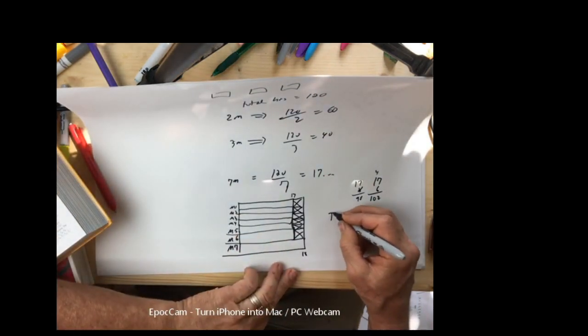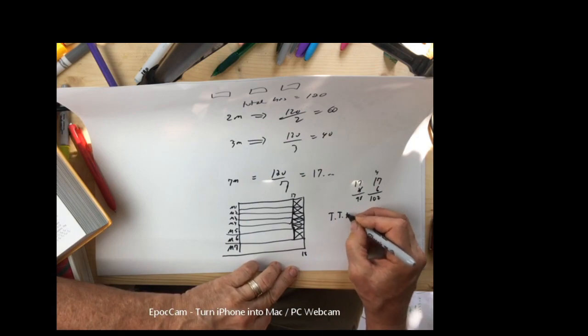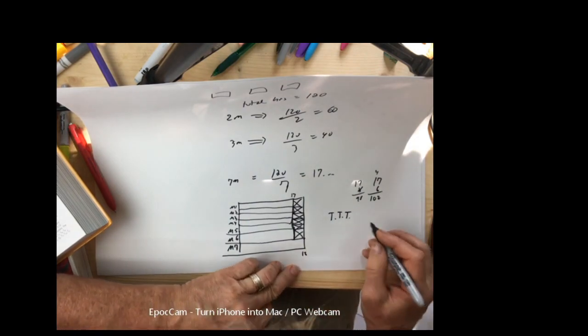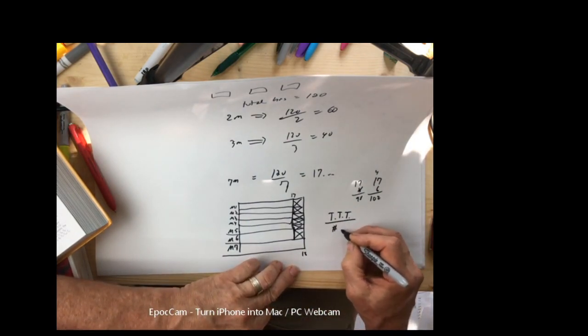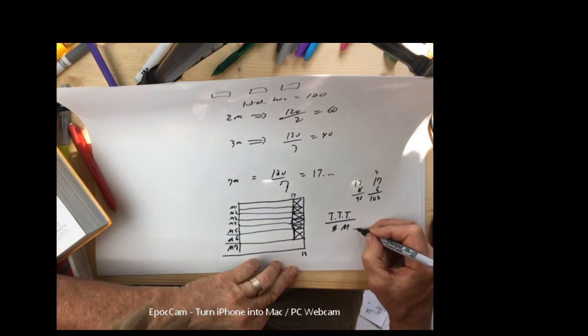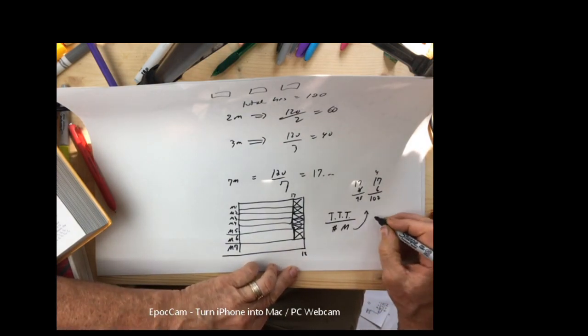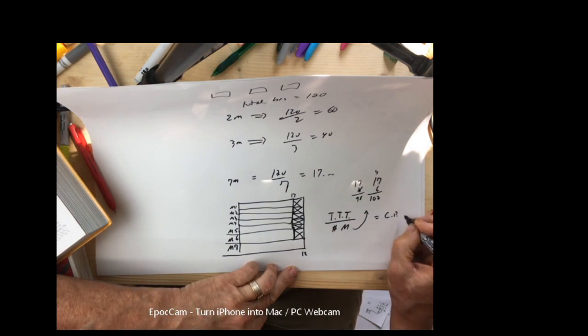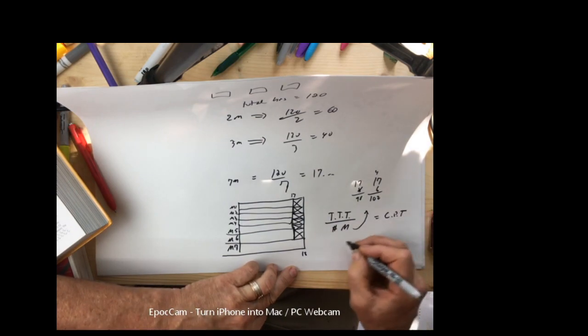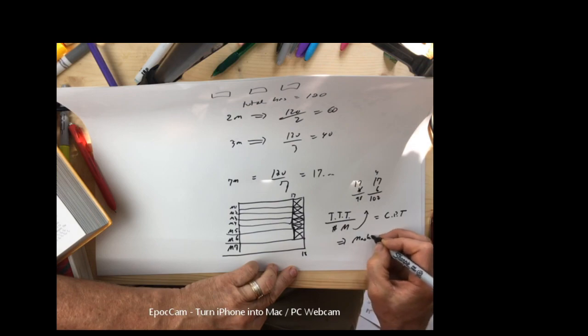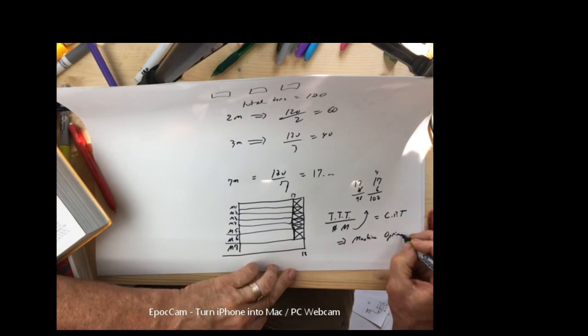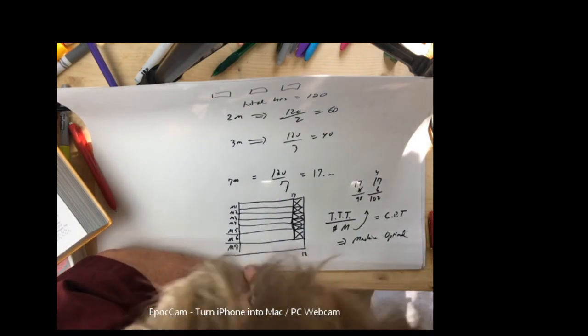So, if you take the total task times, divided by the number of machines, and then you round that up, if that equals your completion time, then you are machine optimal.